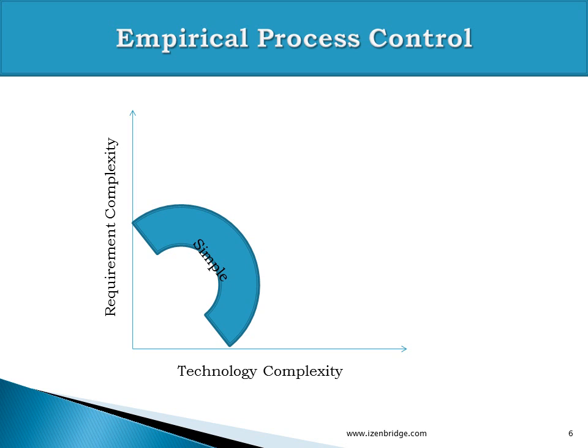But for the same problem, if the company is doing this website development for the first time, and even the end customer is not clear about what kind of site they want to have, then your requirement is not yet agreed. Then you may need to follow an empirical process which recommends short incremental cycles of inspection and adaptation.